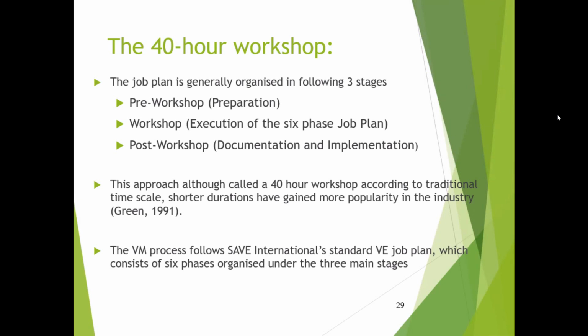So this approach is altogether called the 40-hour workshop according to the traditional time scale, but shorter durations have gained more popularity in the industry. Even though it is decided at 40 hours, practically it may be less than 40 hours, because taking 5 days off your project means it's a huge time.